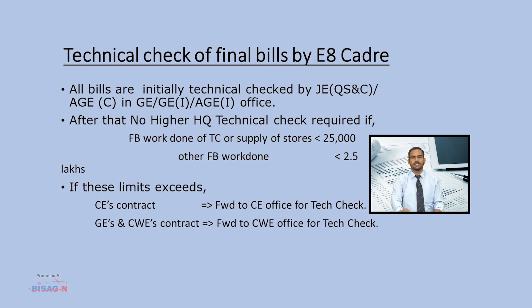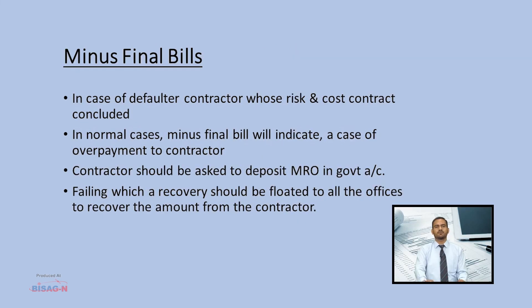At CWE office level, in case of term contract work orders, a minimum of 20% of final bills should be technically checked. For other works with work done less than 15 lakhs, a minimum of 25% of final bills should be technically checked. For works with work done more than 15 lakhs, final bills should be 100% technically checked.